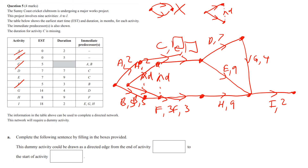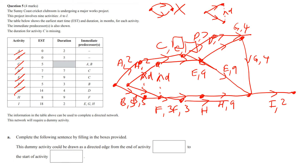Now D and E both need to come off C, so we go D comma 7 and E comma 9. Then G has to come off D, so G comma 4. H has to come off F, so that's H comma 9. Then I is all three of those connected together — do a nice right angle — and that's I comma 2. That's our diagram for that section.